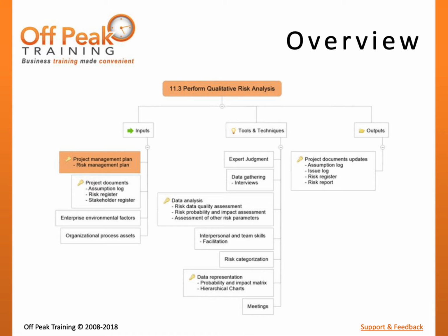This can get tricky because there is often a reluctance to put resource time and effort into researching and investigating events that may never actually occur. Therefore, it is important to properly scale these efforts to the risk management needs of the project. The goal is to understand enough about the unknown to reasonably estimate the relative importance to managing and responding to the risk. This analysis can contain interviews, workshops, research into organizational process assets or lessons learned, or require additional subject matter expertise.